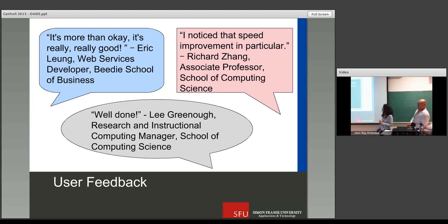Some of the lessons learned. Like I said, we really made sure that the community, all the users, got a say when designing the application, and this really helped with the buy-in. Also, the physical proximity of our project team. We sat close together. There were a lot of new technologies, so it really helped that we could just turn around and talk to the SIMS developer and really understand what their issue is, and it really helps speed up development.